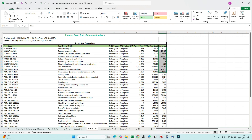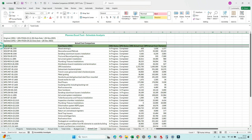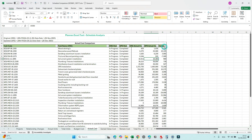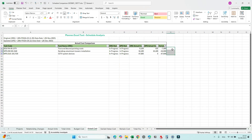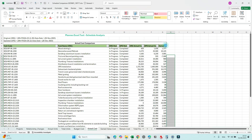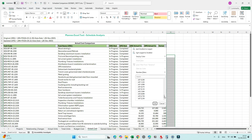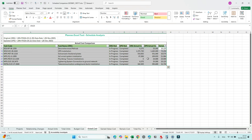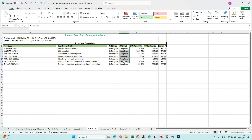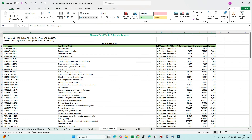Next is Actual Cost. In this version we may not have highlighted the negative variance values, but in a future update that can be added. If we select this row and press Control+Shift+L, we can filter. The negative values here need justification — ask the contractor why there is a significant negative variance. Also check for large values; if there is a big jump, investigate why, especially for completed activities. If an activity is completed, that may be acceptable.